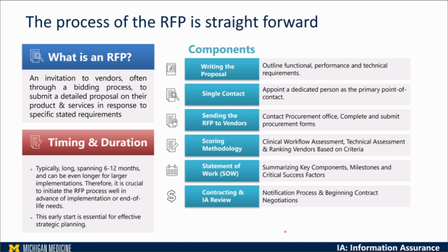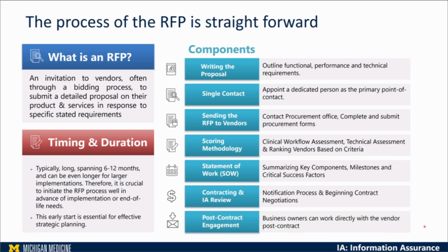You also need to put contracting, information assurance review, and beginning the contract. And then finally, after the contract, the business owners can start working with the vendor.